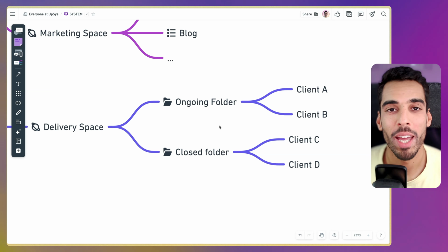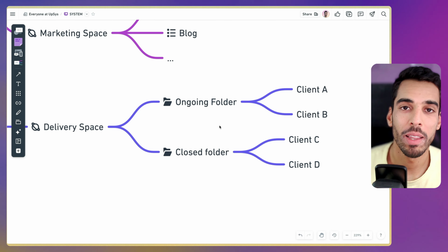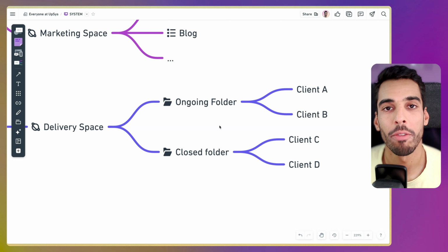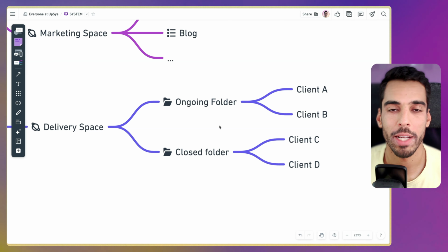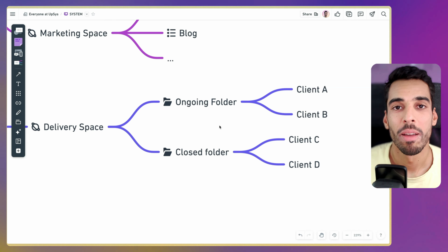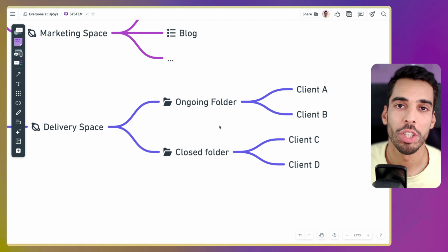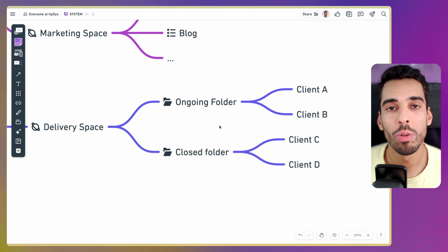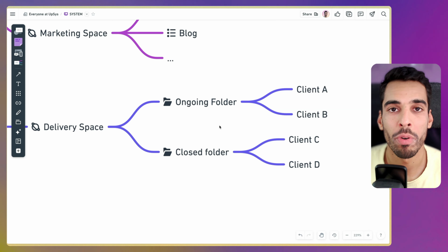Now, there's a big debate in ClickUp whether a client should be a list or a client should be a folder with different lists as projects. I prefer to structure clients as lists and put projects as tasks with up to 3 or 4 levels of subtasks for each project milestone and the steps to go through it. And I choose this direction with my clients because I think it eases up the navigation on the hierarchy on the left, and usually you don't really need to have a list per project, because imagine you have 10 clients and you have 2 or 3 projects for each.